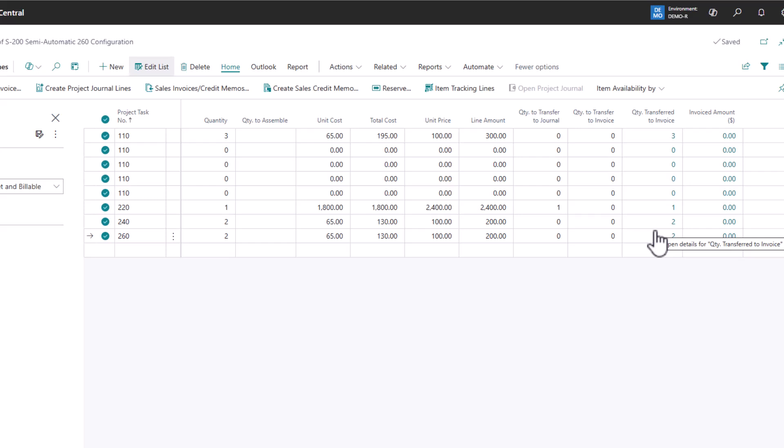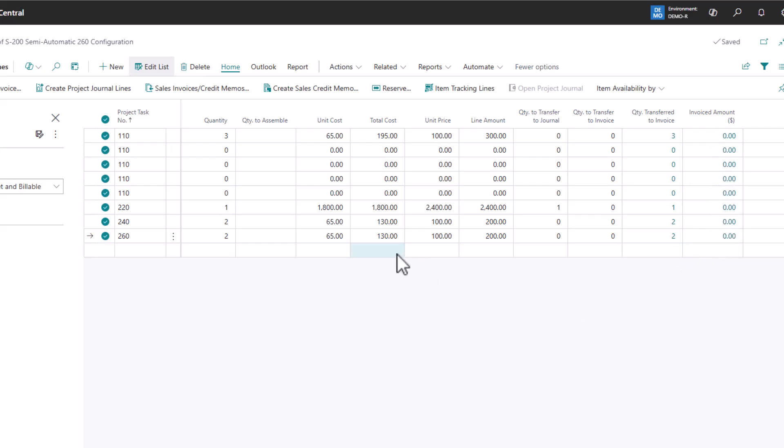That's why I'm able to go and delete the sales invoice and recreate it, is because the system is tracking that in real time. And so as I then post that invoice, it will know that a certain amount has been invoiced. If I needed to, I could change my quantity and bill more. And that would allow me to bill the increment up from whatever I had billed before. Or I could simply create a new planning line to bill for any additional amount needed.